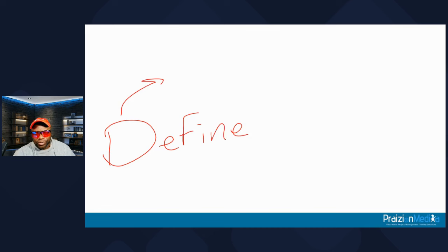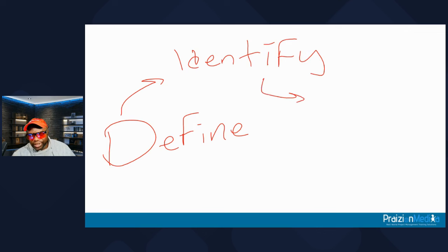Then you identify the root cause. Then you generate alternatives that make sense. Then you choose the best alternative.